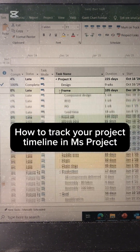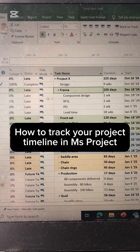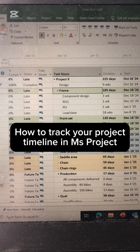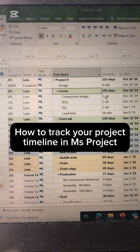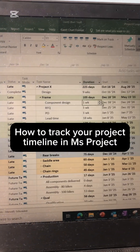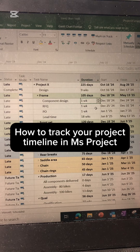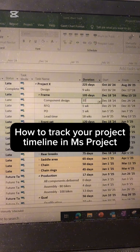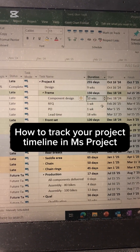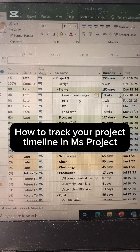Based on that, you can update task by task, going through the different levels you have and checking if each task is completed or not. If a task is not completed, you can arrange a different duration. For example, instead of taking one week, let's say it took ten weeks, so you update it here.